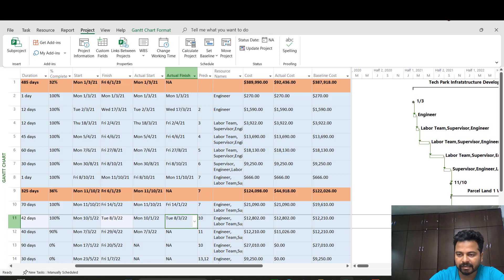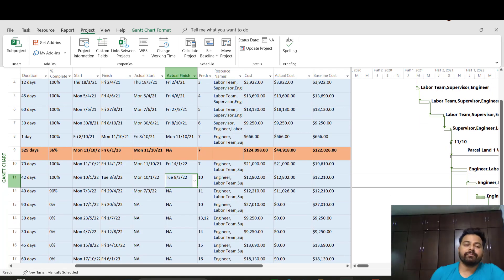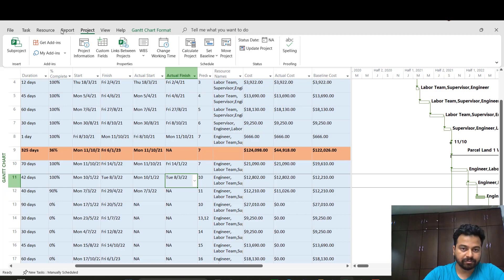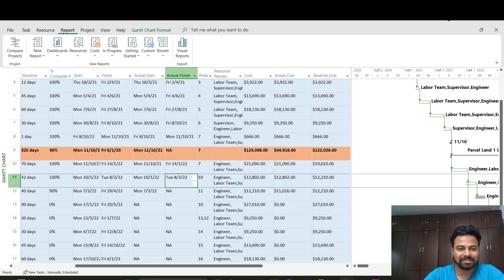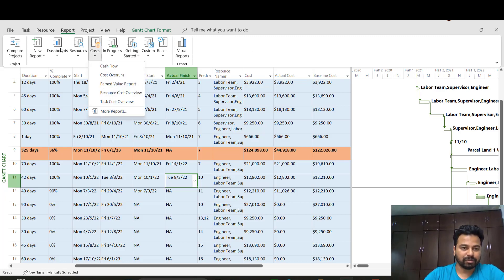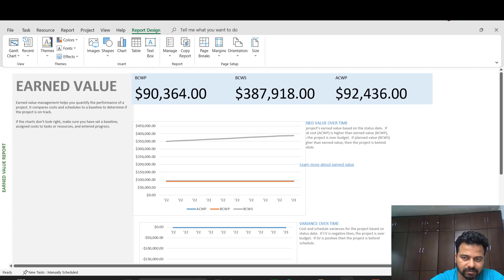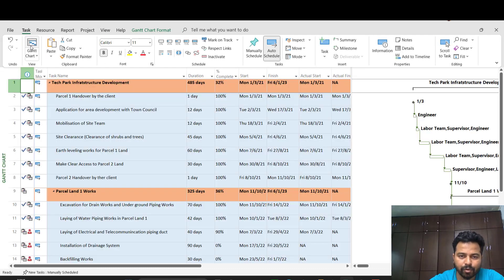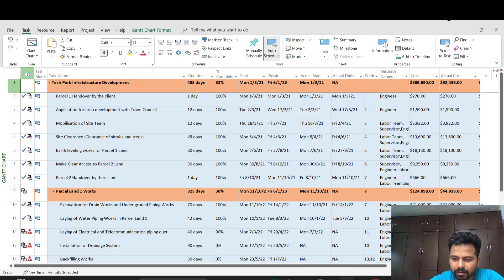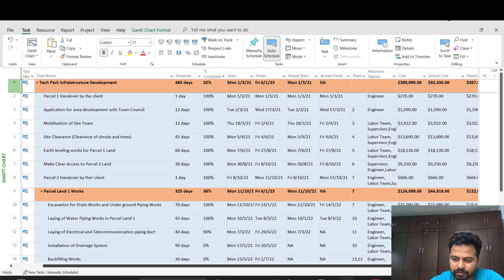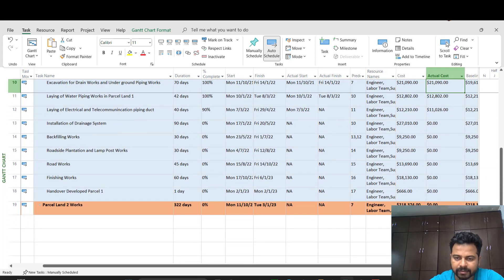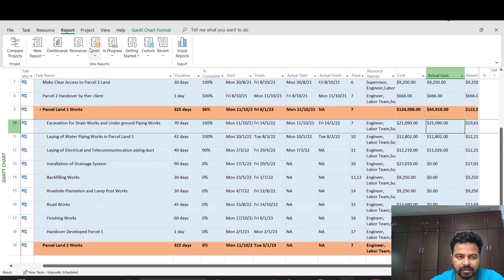Now we're coming back to the earned value. Let's go to the reports. We want to see earned value. We are excited to see what is the earned value graph. So I'll go to Cost in the report. I'll just select Earned Value. For actual cost, $2,100 is excess compared to the planned earned value. So that is because, going back to the Gantt chart, we have this extra cost over here - instead of 19k it's 21k. So this is the reason where we are noticing the actual cost against the earned value.